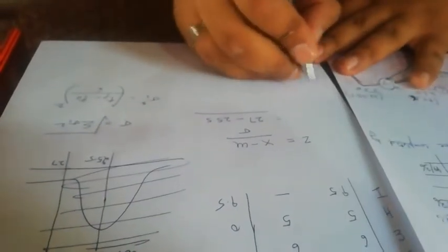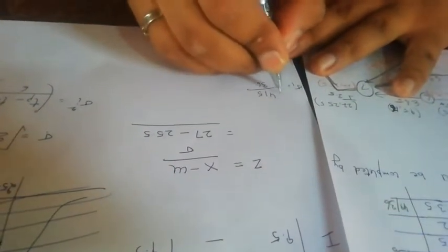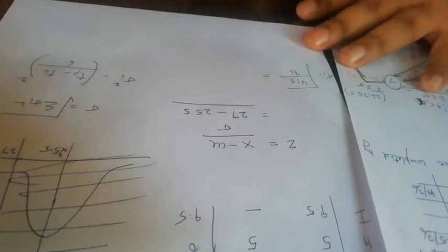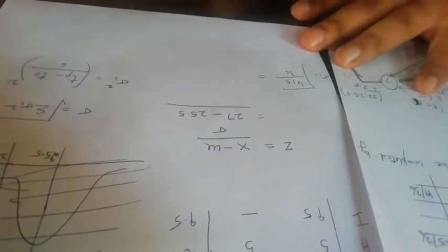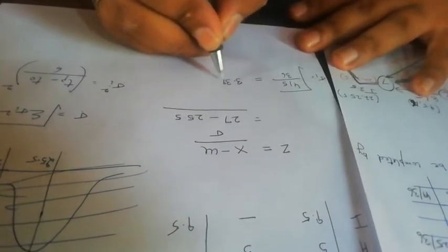For sigma we have to total all of these and then take the square root. The total becomes 415 divided by 36. So this is the summation, and the square root of the same comes out to be 3.395.